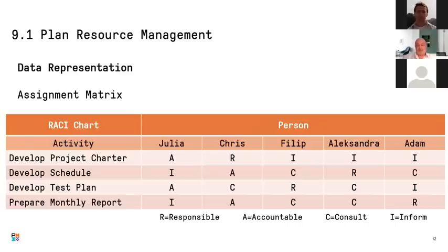Usually the project manager prepares the charter. Let's say the charter is the task you are talking about. The project manager is preparing the charter, but is he doing it alone? No, you will usually find a C. If you remember, one of the tools and techniques in develop project charter is expert judgment. So maybe in my organization I'm asking my finance manager when preparing the project charter. The finance manager will be C, but it's my choice as R, as the project manager, to include this information that I was consulted with or not. So I'm really responsible for what's inside this charter.